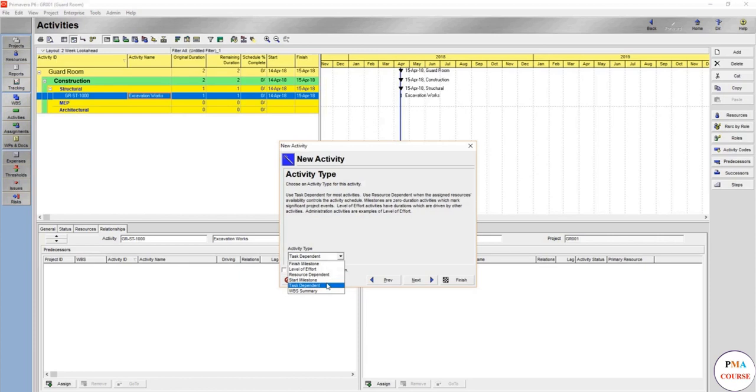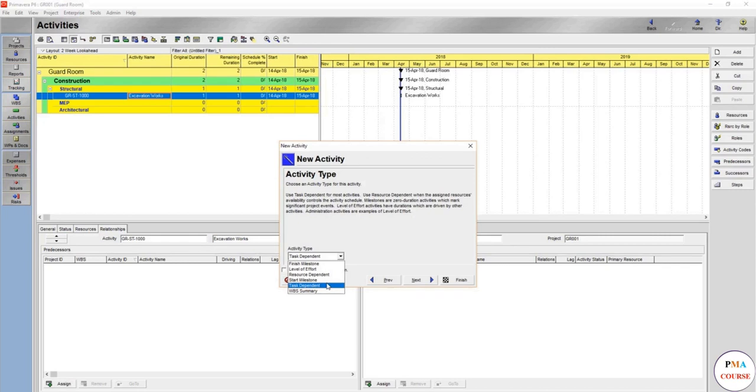Or you can make it task dependent, which is you have five days to finish this item, and accordingly you're going to make your calculations, or expert judgment, or even analogous estimation, and make sure analogous estimation like comparing with another older project, similar project, or even expert judgment asking the experts, or even parametric which is using the productivity rates.